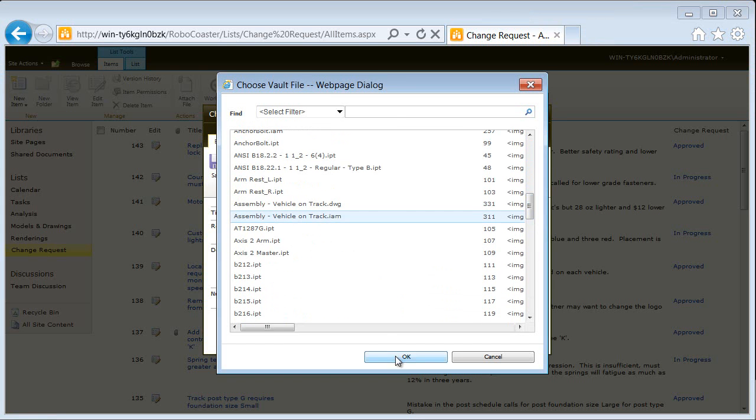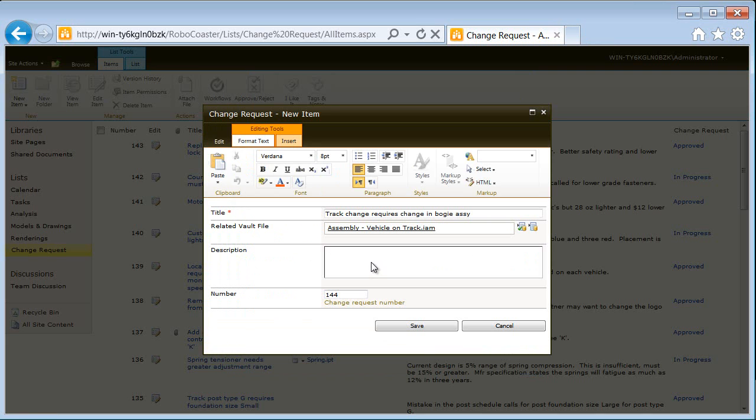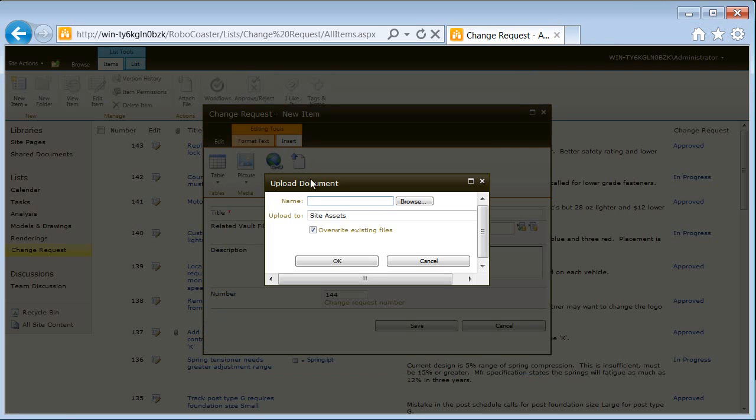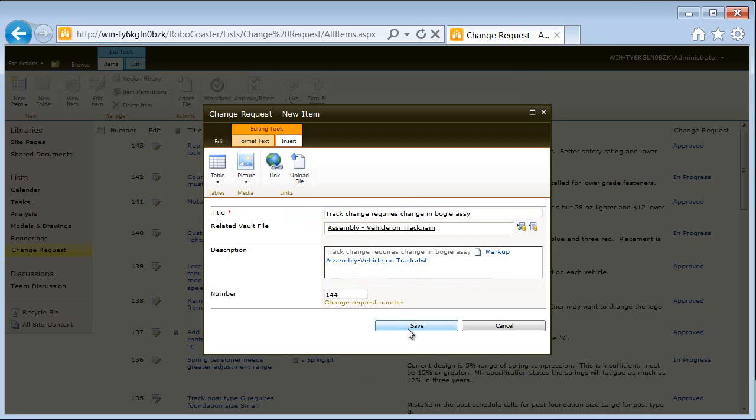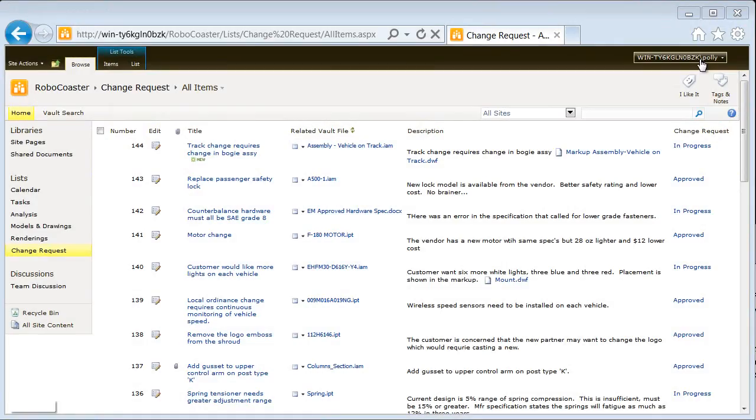As an example, we'll create a change request, linking both the model from Vault and the markup file. Upon submission of the change request, a task is automatically assigned to the program manager.